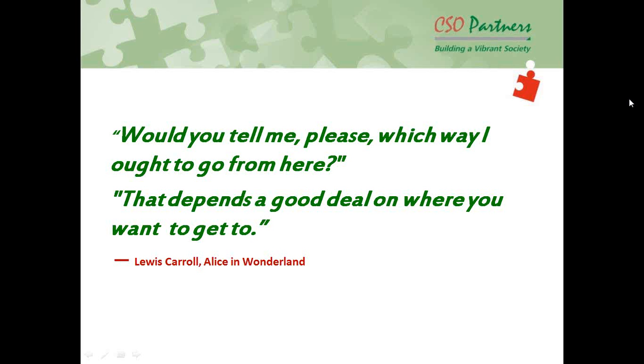Say, you are giving a training on improved agricultural practices, farming practices. Your assumption is that once you give the training, in the first level assumptions, the farmers will absorb the knowledge. There will be an increase in knowledge. The second level assumption, you are thinking that if there is increased knowledge, they will apply that in the farm. That is also an assumption. This is something you assume.